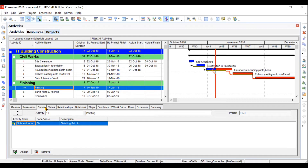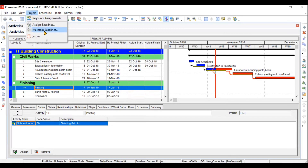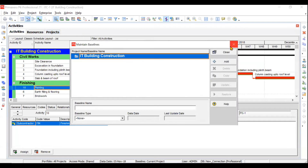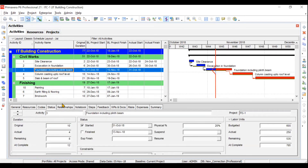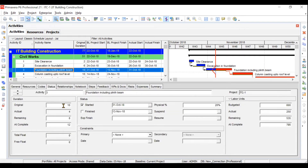Then we will move to assigning and creating baselines — what a baseline is, how to maintain it, and how to assign it. After that, we will do progress and status updates. If you click on a certain activity under status update, you can see the original duration, days already crossed, remaining duration, expected completion date, started date, and expected finish date.